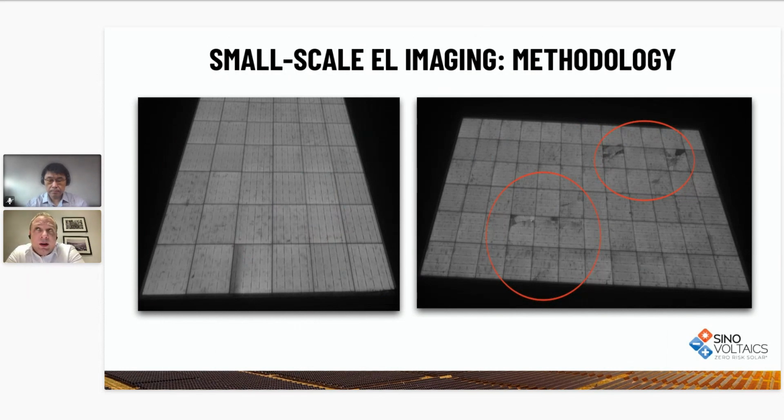Unless you employ a large team with multiple EL testers, so that you can measure massive quantities of modules in a utility scale power plant, and basically with EL imaging speeds of, say, 200 to 300 modules per equipment and team per night, it would end up being too cost prohibitive to approach such large scale or mass scale projects with these portable kits.